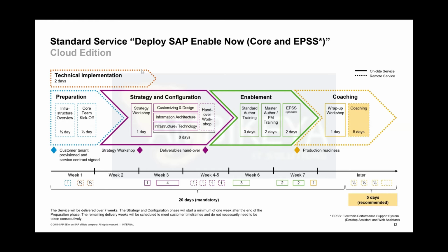So say it again, Dave, please. You have another day of technical implementation. 2 days of technical implementation. Yes, for EPSS in comparison with Core, where we only have the manager to install basically and discuss a bit of the client technology, where 1 day should be sufficient. And so for EPSS, we always add 1 day of technical implementation in general. Yeah, you've got in your week 1 still half a day there at the bottom. Okay, that's wrong. Yeah, all right.